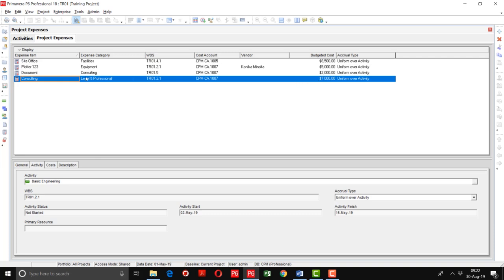An important thing I want to tell you is that expenses are non-resource costs associated with the project and assigned to the project activities. They are typically one-time expenditures for non-usable items. Expenses are not leveled like resources. Resource curves are not supported for expenses.